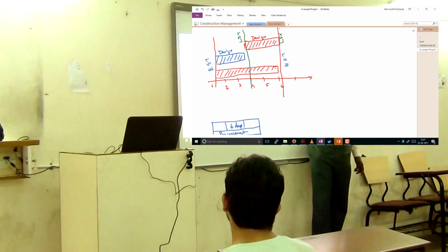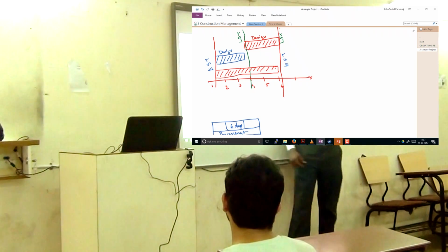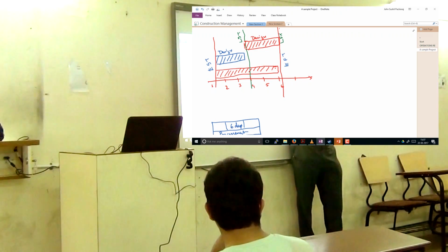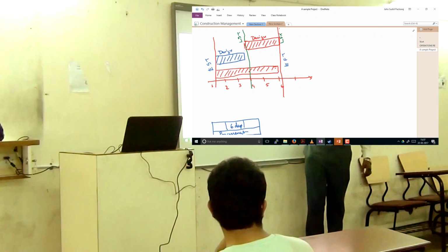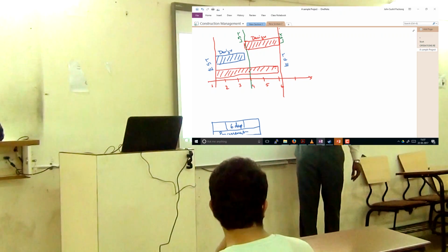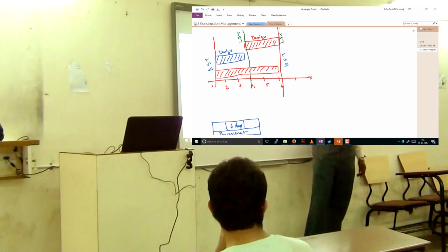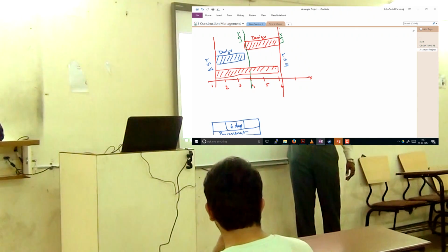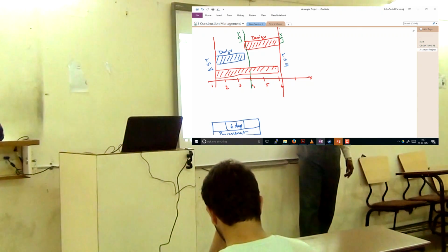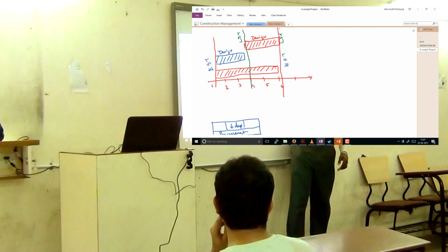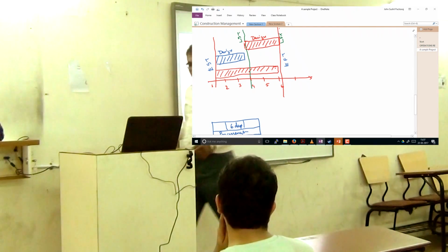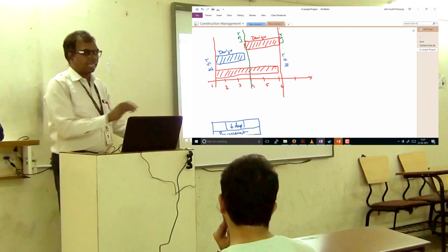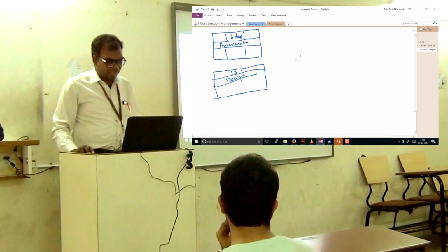This is not governing the finish time, because this has the longest duration. This activity has procurement as the longest duration. So what happens is, this activity determines all the activities before this point in time. You will come to understand that it lies on the critical path a little later, but as of now, just make that observation.